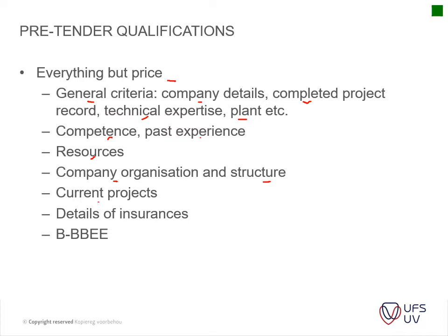And then in many tender documents, your current commitments is also asked for. So sometimes it might be neck and neck between you and another company, but it might be a situation of you are a bit overcommitted at this stage, so you might not be able to do the work in the next few months. So then it would be better for the client to rather give it to someone that doesn't have that much work. This is usually a difficult thing to assess if you're on the consultant side.